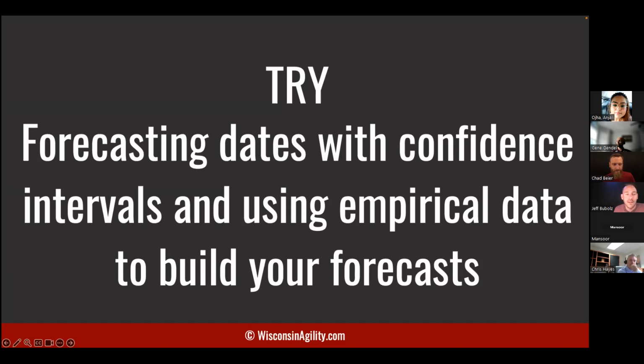What that looks like is, hey, we have an 85% of date A. We have a 50% of date B. We maybe have a 30% of date C. And we can go every 5%. There's tools that help you do this very easily. And at that point, you're putting the risk tolerance, you're having a conversation about that with your stakeholders, right? If they're funding you and you're saying, hey, we have this big government contract and we need to hit this date by this time, or we don't get this $1 million kicker. And you're telling them, we have a 50-50 shot of hitting it. And if they don't do anything about it, they're taking the risk of a 50-50 shot. And you're agreeing to that, I guess, as a group.